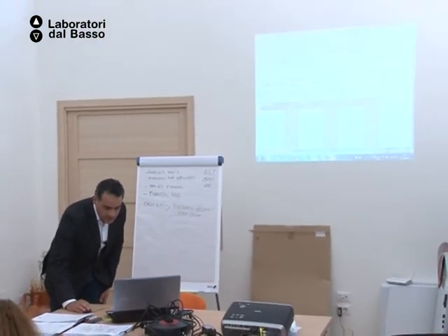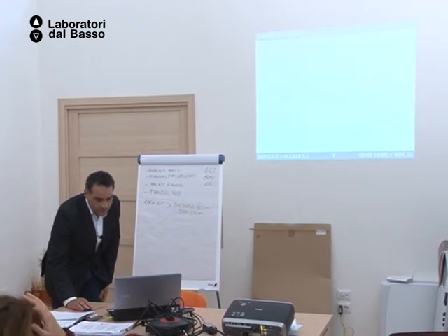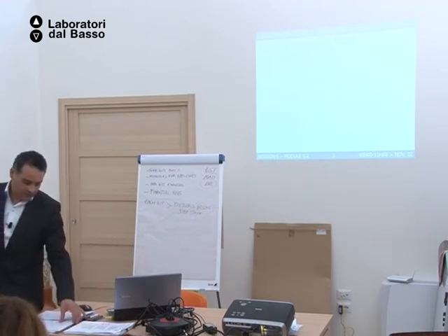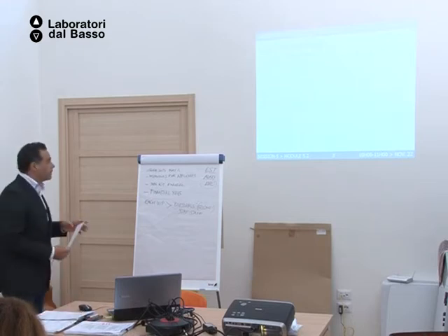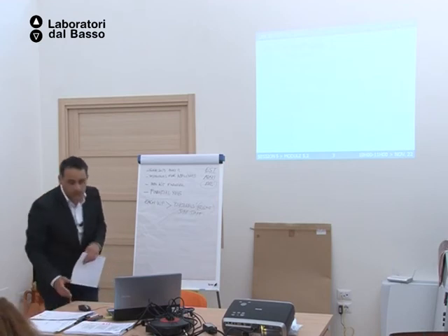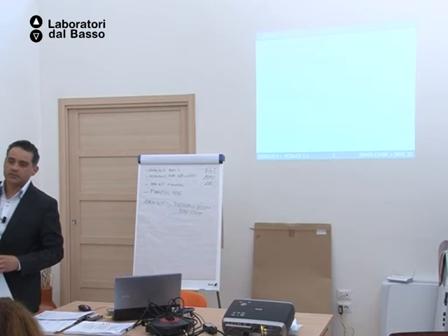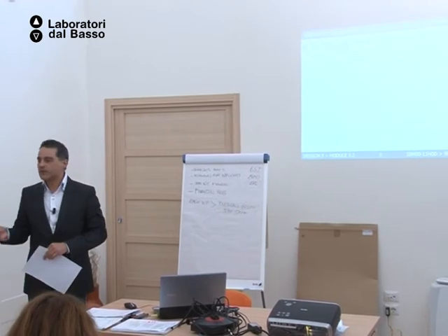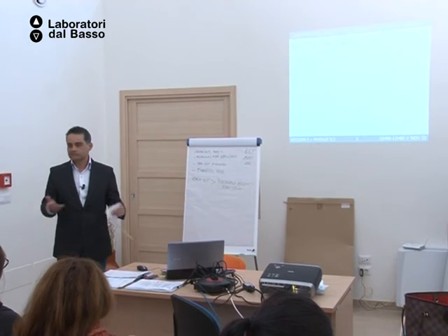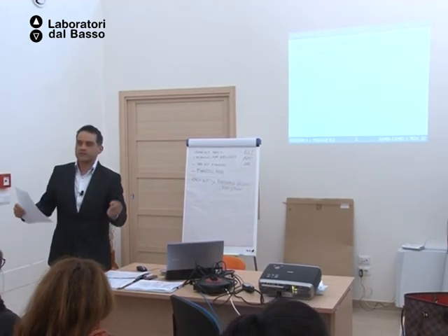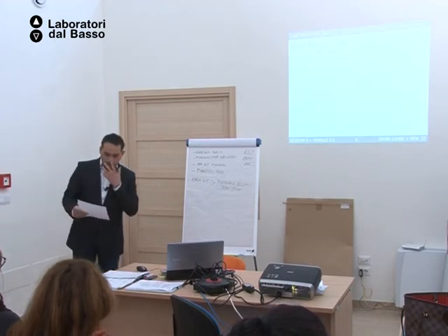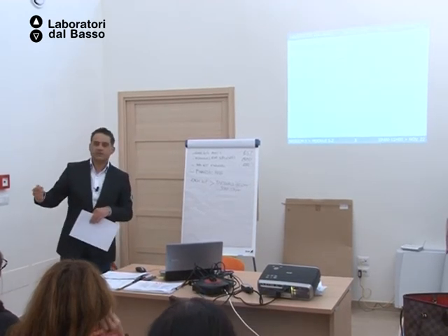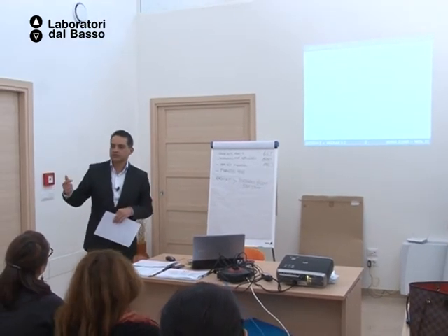Let's go back to, now the sun is helping me, the staff sheet, some key points. There is this situation on the working days. In this framework, they consider 220 working days in the year. Well, you know that each member state of the European Union has different frameworks, legal and tax and social frameworks too, okay? So what you need to understand is what they mean by staff cost, days, and all that stuff, okay? So there is 220 working days in the year.